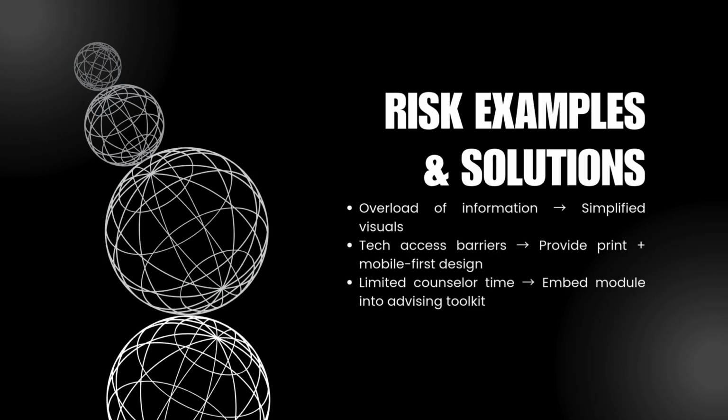Here are some practical examples of how I plan to respond to risks. If information becomes overwhelming, the solution is simplified visuals to keep the content digestible. If families lack technology, I'll provide print based materials along with mobile first priority designs. If counselors' time is limited, I'll embed the module into existing advising practices rather than adding new responsibilities.